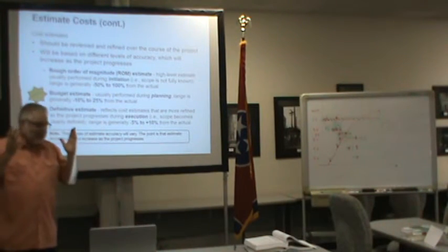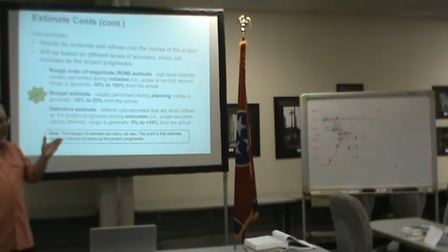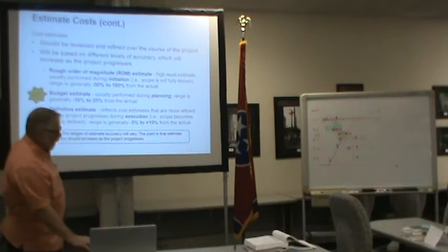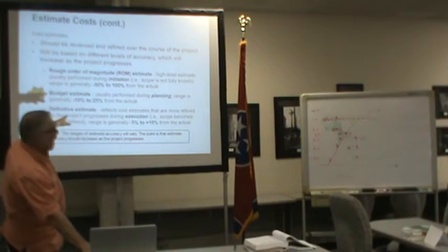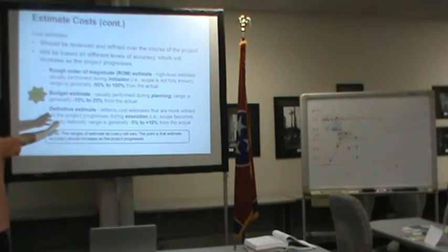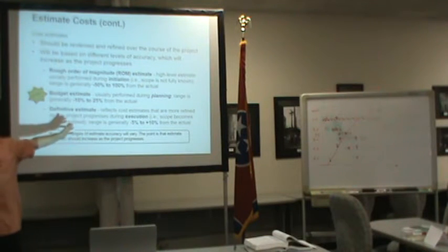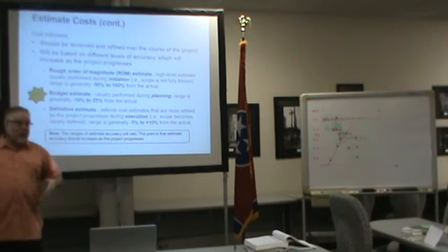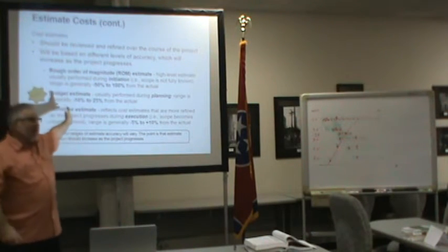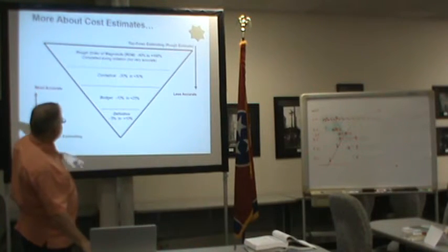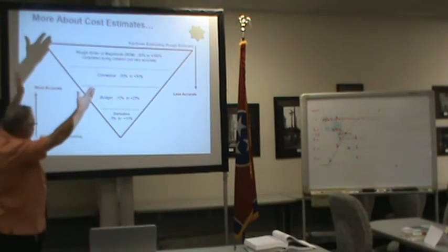Again, know the pitfalls, know the risks to us as a project manager, but these kind of estimates get made all the time. Budgetary estimate. Now, in theory, this is where I'm really going to start talking about getting money, because we're going to call that a budgetary estimate. The pitfall for us as project people is if I give a rough order of magnitude estimate to the wrong people, that's going to become my number. So just be careful. You know that. You've seen it, or you might have seen this before.